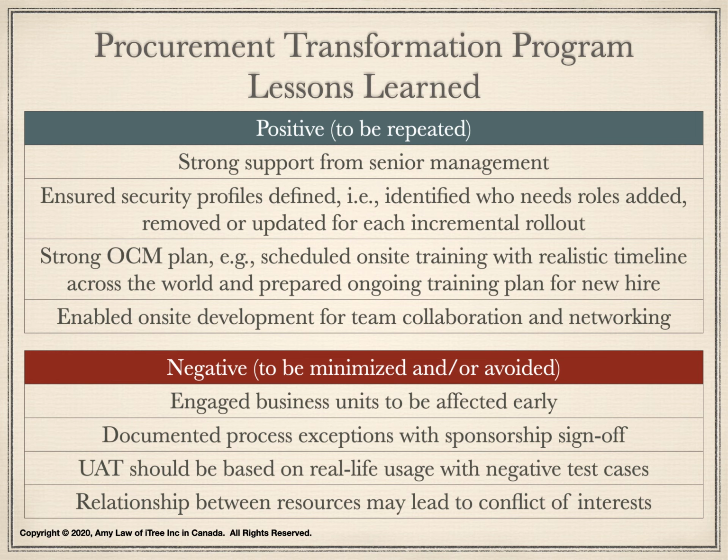We enabled on-site development. The project budgeted developers from the USA to come to Calgary every 2 weeks. This enabled team building and knowledge transfer between vendor and client operational teams.